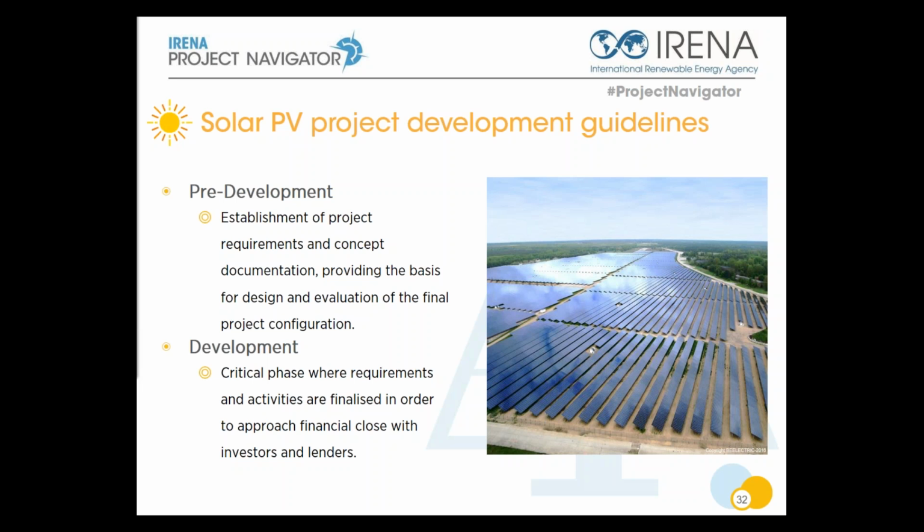So essentially defining what is bankability. Because bankability, if you look at it in a traditional sense, is when the project IRR is more than the cost of capital. But of course, certain investors, certain lenders will have their own criteria to judge if a project is bankable. And the job of the developer is to prepare all the discussion topics that will arise from: do I want to invest in this project, or do I want to finance this project?